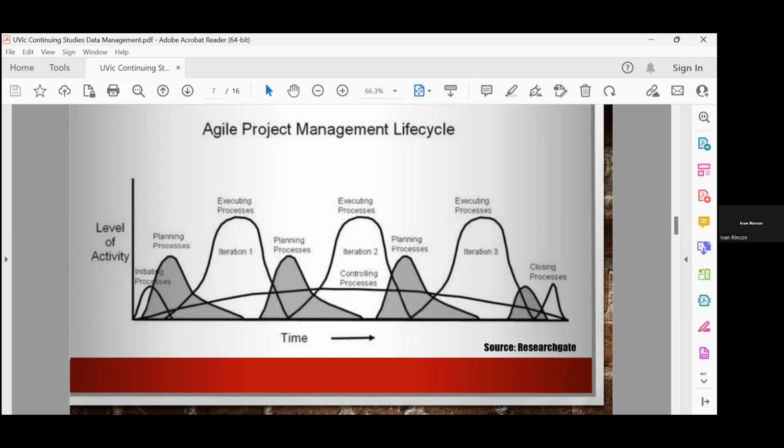Okay, perfect. So you come and you plan for the next 3 weeks. Well, guess what? That initiates a 3-week cycle for the project. Then you plan for it. Well, yeah, they call that sprint planning, but it's planning. Then they execute that. Well, perfect. That's called the sprint, but it's executing. And then they close, deliver a little piece of the project, and it works. Great. But guess what? That is also a life cycle. And by the way, it looks exactly like the other project management life cycle. So, short announcement here: agile project management life cycles are not different from the traditional project management life cycles. It's just that they are done in shorter cycles, but the concepts are exactly the same.